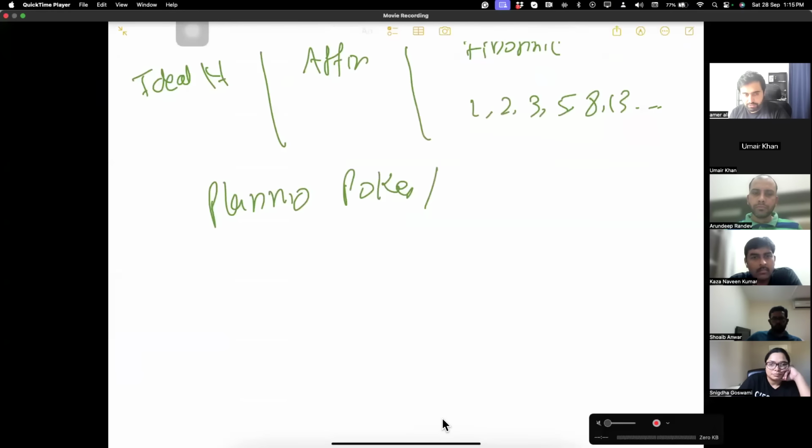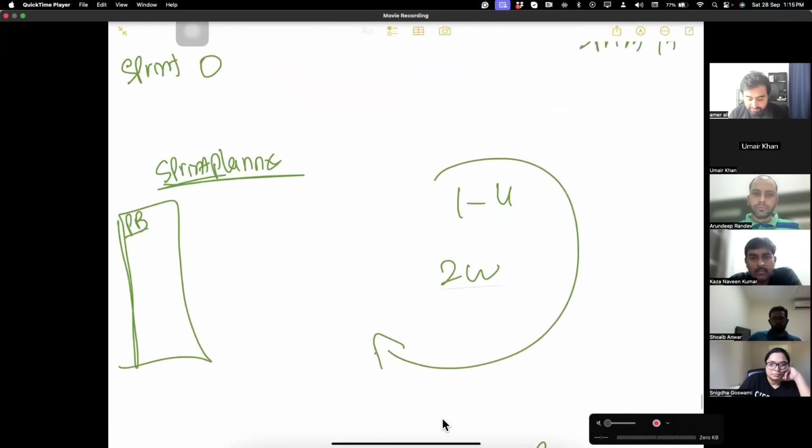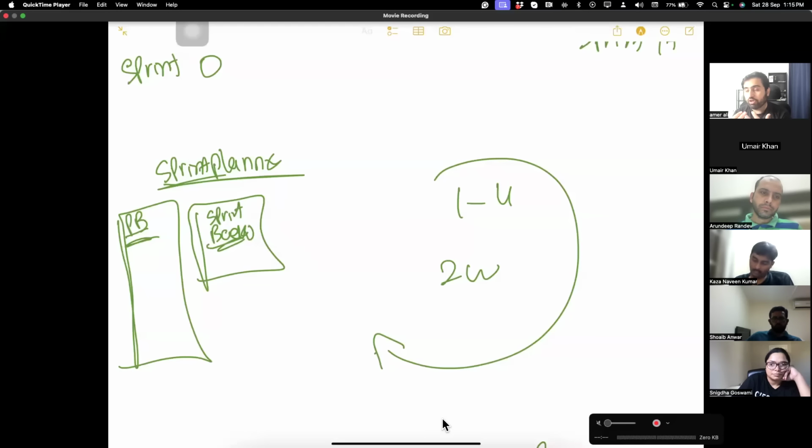So we select the work from the product backlog and put it in the sprint backlog, and we get a sprint goal, what we should do. And that is communicated to the product owner, sponsor, etc. Then we do the daily stand-up.